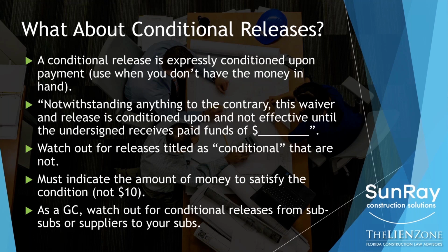So the project may get liened, and the owner is going to expect you to bond it off. You may have a bond on the job. So as a result, you need to deal with that and probably have to pay twice, because the supply house has all the rights to make a claim on your bond or lien the project until they get an effective release. And a conditional release that doesn't have the condition satisfied by them getting the money is no good. So be very careful about that.